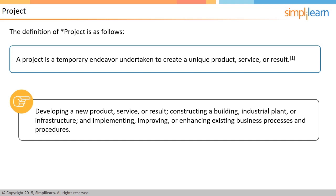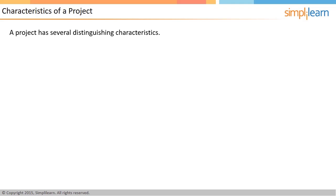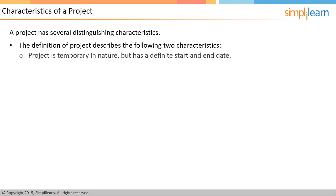A project can be distinguished based on its characteristics. The definition describes two characteristics of a project. First, it is temporary in nature. Temporary here does not mean short in duration. A project can extend for long duration based on the requirements — for example, creating a new indigenous missile defense system for a country. However, there is always a definite planned start and end date for a project; it cannot go on indefinitely.